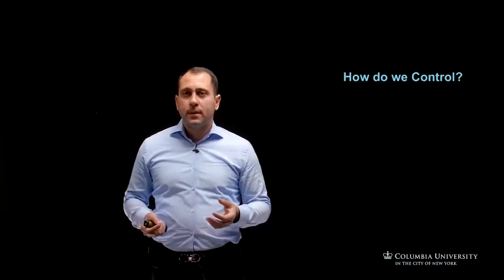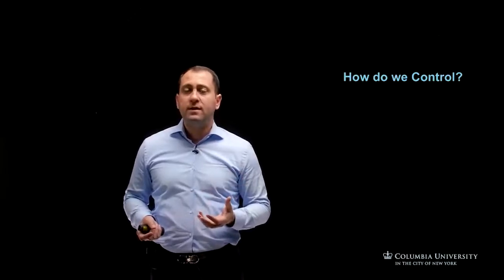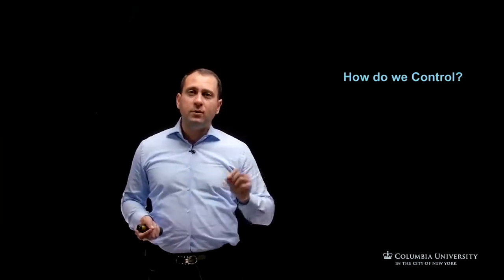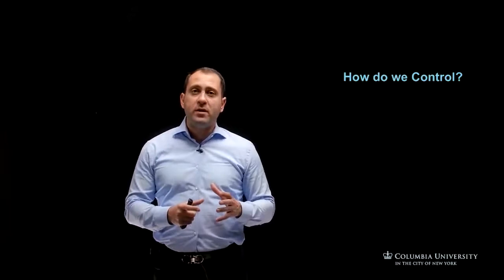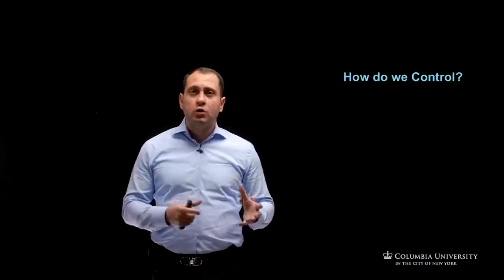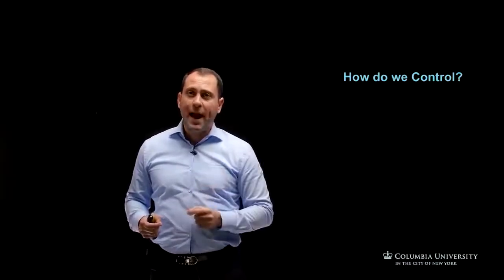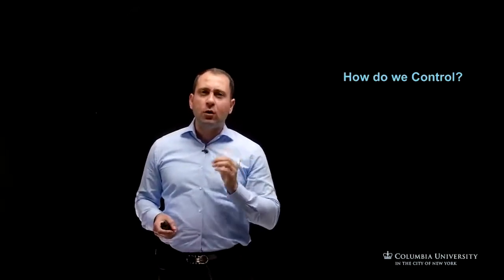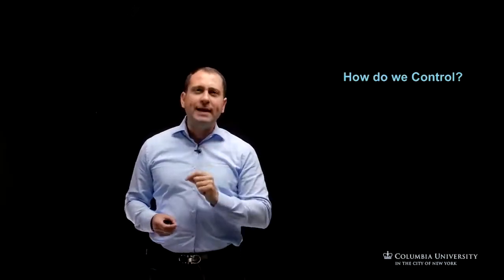There are 2 general types of control. There is the real-time control, and there is what we call the trend control. So for the real-time control, it is usually achieved by comparing the actual value of a performance measure to its planned value. Also, it is important to have control limits, which are set in order to assess the severity of any deviations in the plan.